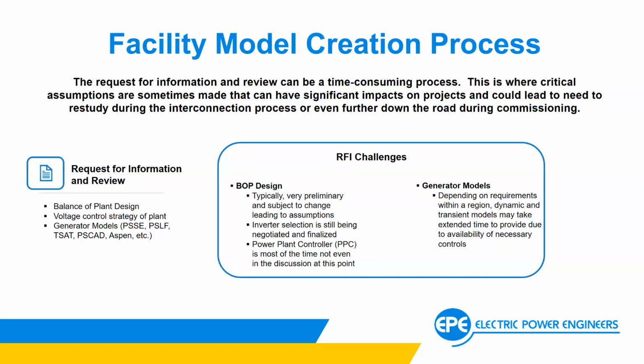Also, we see a lot as of late that inverter selection is still being negotiated and finalized, depending on what status the project is in. It's uncertain. They may have two vendors that they're discussing options with, whether or not the model is being discontinued, or they want to go through a different model, pricing structures, et cetera. That has a significant impact, because choosing the inverter at this point going into the interconnection, and then changing it later on, could lead to material modifications, queue restrictions, and restudies that could be very costly and untimely to the project in terms of meeting their COD.